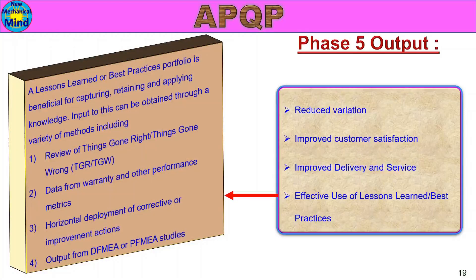Effective Use of Lessons Learned and Best Practices: a lessons learned or best practices portfolio is beneficial for capturing, retaining, and applying knowledge. Input to this can be obtained through a variety of methods including review of things gone right and things gone wrong (TGR and TGW), data from warranty and other performance metrics, horizontal deployment of corrective or improvement actions, and output from DFMEA and PFMEA studies.